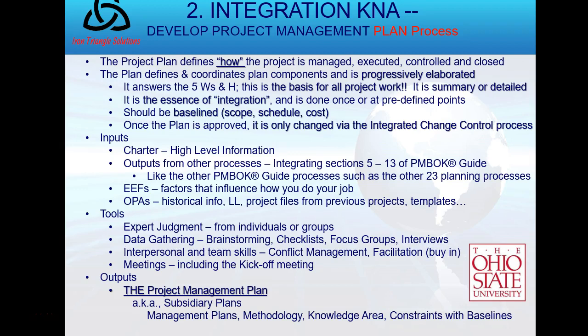And the plan, of course, must be baseline for at least scope, time, and cost. Must be baseline. Once it's baseline, it may only be changed through the Perform Integrated Change Control process. That's the only way to change a project management plan, through ICC.